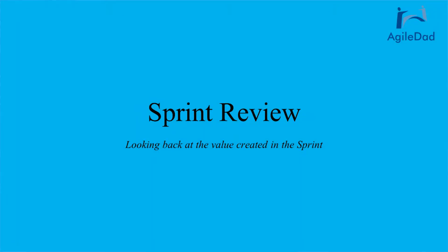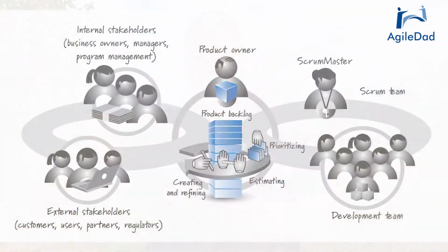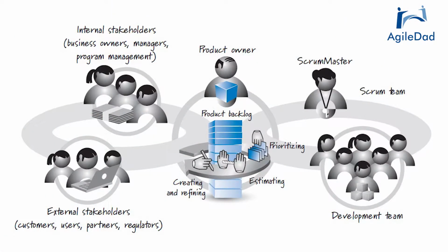Next, let's take a look at the sprint review session. The sprint review session comes at the very end of the sprint. The sprint review is to analyze whether we have truly done what was committed to during the sprint planning session. So the team is working toward this end goal to be able to see what they have done and how it is potentially successful as far as delivery for the product owner's sake. Typically, these are half an hour to an hour at most.